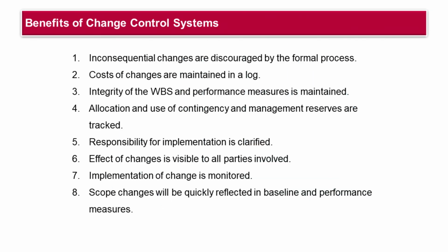Without integrating the change control system with the WBS and baseline, project plans and controls can fail. Effective change control hinges on meticulous documentation. Benefits include discouraging inconsequential changes, logging change costs, preserving WBS integrity, tracking reserve use, clarifying implementation responsibility, making change effects visible, monitoring change implementation, updating the baseline with scope changes. A well-managed change control process is vital for maintaining project control, satisfying customer inquiries, and aiding post-project audits and future